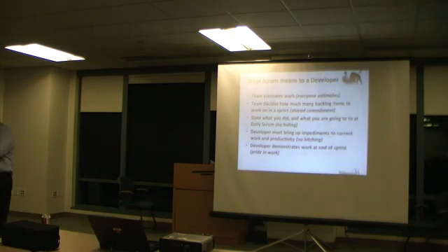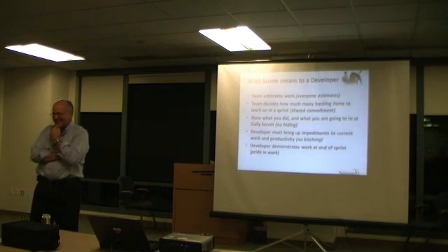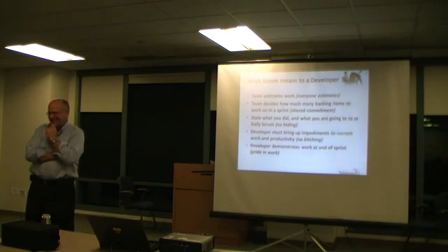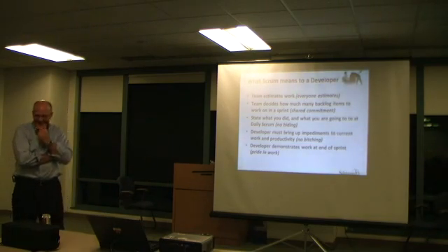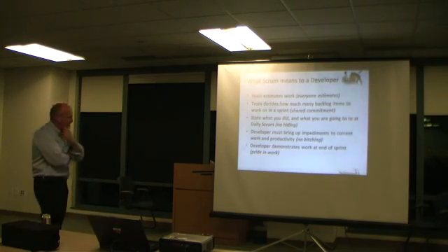I was just gonna say that we've experienced where if you're too task-centric, the story can not get finished. Oh, yeah. You can't be like, if the manager is tracking tasks as opposed to stories, there's a resistance to putting new tasks up here. So I've got all the tasks done, but the story still isn't done. Yep. We weren't complete. Another good anti-pattern. Yeah, exactly. That's good stuff.